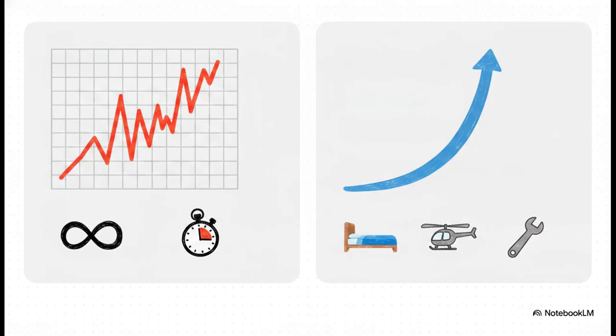To fix this, you really need to understand that there are two distinct profiles you have to produce. And yeah, you absolutely need both. First, there's time analysis. That's your spiky, theoretical profile. It assumes you have infinite resources, basically telling you the absolute shortest duration to get the project done in a perfect world. But then you have the resource-constrained profile. This one applies your real physical limits, things like beds, bunks, helicopter flights, craft availability. This tells you the duration you can actually deliver.